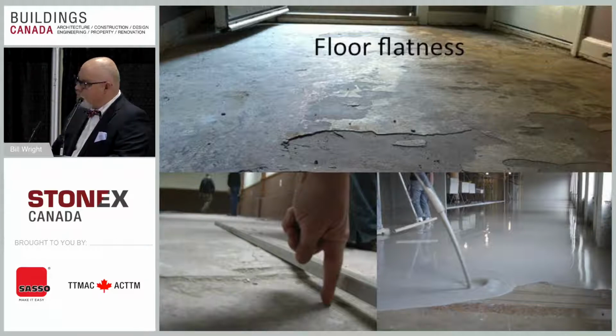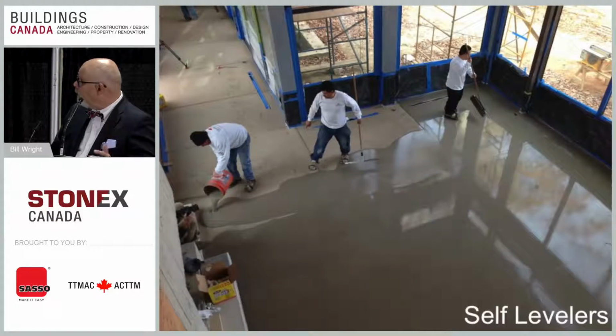This is going to cost somewhere, again, for labor and materials, a little more expensive, about $3 a square foot, but you save a fair bit in terms of having to rip out, if you can go over top of existing things, say existing tile. You don't have the rip-out costs, but you might have a little more in terms of floor prep. Here's an example of them putting down some floor self-levelers.